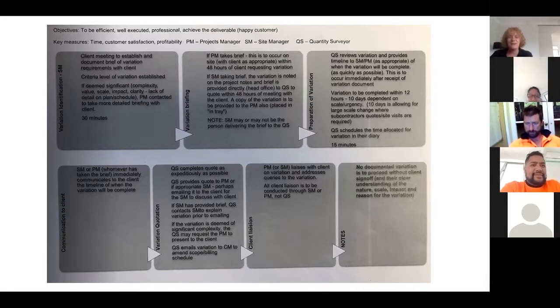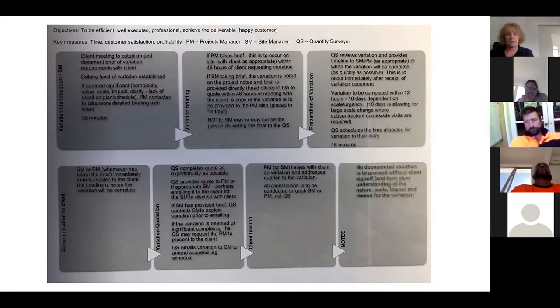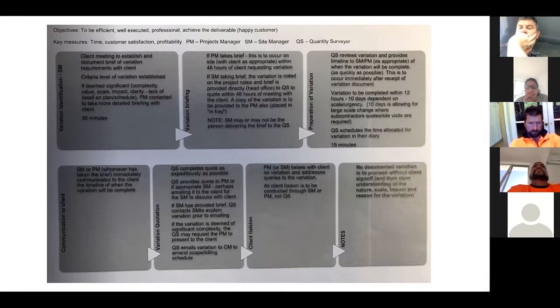I've been introducing this more since we did the summit and had the talk on it, and I've found it's gone down really well with the client. I've started to make it clear up front, on my website and on the quote, that any variations will be written down and need to be signed off. That's gone down really well in the last couple of weeks. No surprises, eh? Communicate with the client, let them know the expectation, and it gets rid of any uneasiness. And it's not saving it till the end and hitting them with a big bill. It also means I'm getting paid for it as it gets done, which is fantastic. Exactly. Thanks, Lynn.